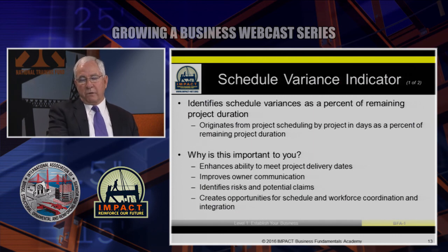We believe that if you set this schedule up at the beginning of a project, that you man load and cost load your project schedules, you'll be able to determine what some of those things are that you can do to front load or aggressively bill and overbill on your projects. And it also will enable you to do some important things regarding project delivery dates. It helps with communication with the owner if you've got an accurate schedule and know right where you are and what's going to be required to finish. And it identifies the risks and potential claims that may be arising on a project. So this always creates an opportunity for schedule and workforce coordination and integration with all of the players on the project. And some of the best practices involve setting this schedule up at the very beginning of the process.